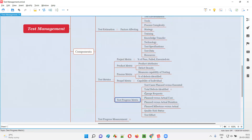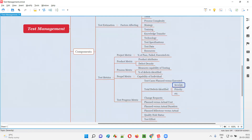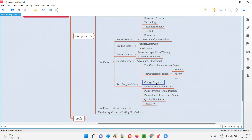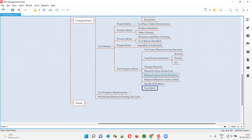Then test progress — how many test cases planned versus how many test cases executed, total defects identified by the team categorized according to severity, priority, and other categories. Change requests — how many change requests are being introduced by the client. Planned versus actual cost — are we completing the testing in time and within the budget. Milestones — which milestones we have to reach by what time and whether it's happening according to plan. Quality status — is quality going well, are there any risks. And efforts — how much effort the team is putting into testing.